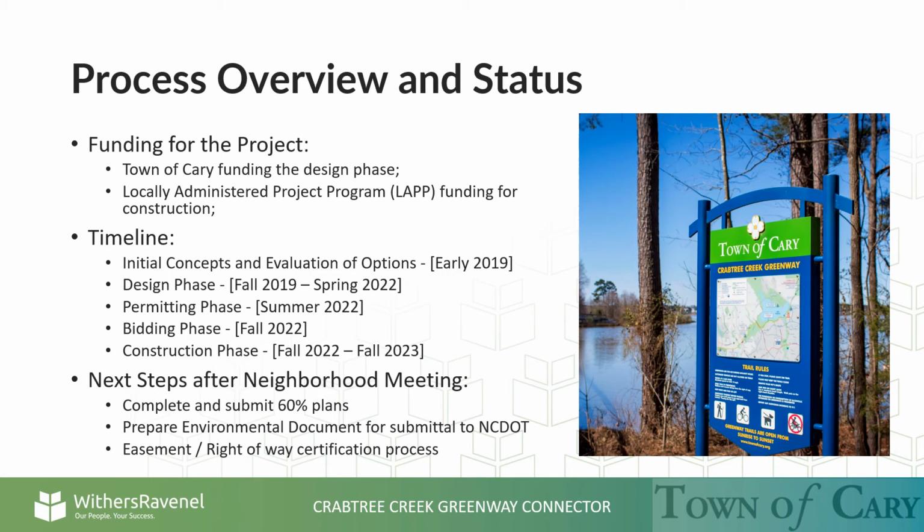After this neighborhood meeting, the next steps the project team will take are completing and submitting 60% plans, preparing the environmental document for submittal to the NCDOT, and going through the easement and right-of-way certification process.